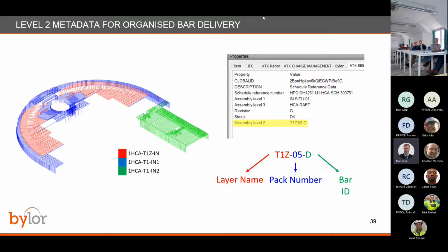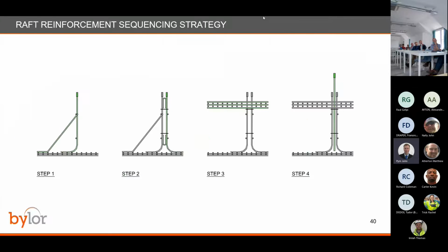And then the bar ID in green, every single bar in every single bundle, they gave a letter of the alphabet to. And what they were aiming to do there is, if you want to find any given bar coming in on a trailer, you should know exactly what bundle it's in. You should know exactly what trailer that bundle is on. In practice, I'd say it worked pretty well. The amount of time searching for bars went down hugely. Did have a couple of teething issues with bars getting ripped off in transit. Those have all now pretty much been resolved. They're doing well and having no problems at all finding bars. So that one helped us hugely.